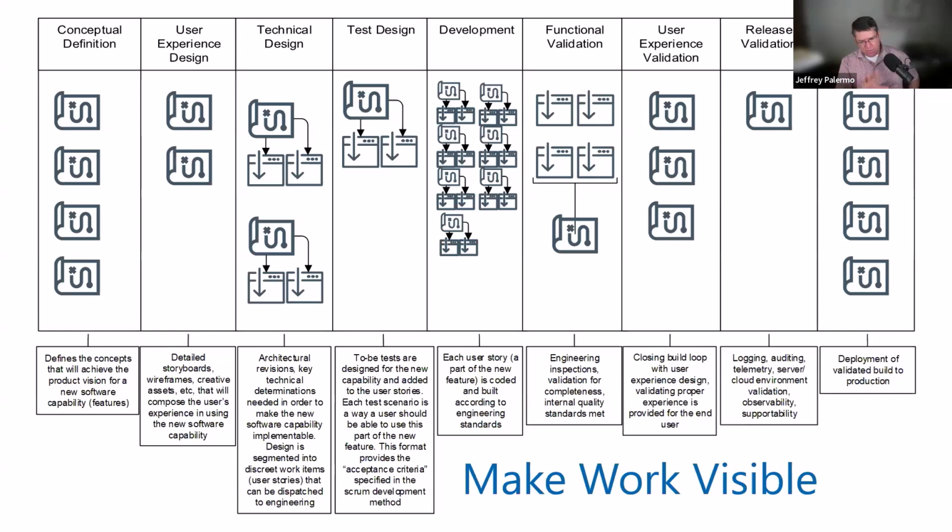Armed with all of these previous design decisions, we determine how we're going to test this software behavior once it's actually working. It also gives us the chance to define the concept of done: what workflows are in, and what workflows are out for this particular scope change.